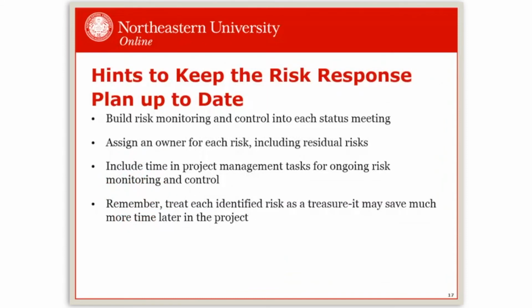Just some other things, keeping the risk response plan up to date. We've talked about the importance of adding it as a line item into each status meeting, delegating some ownership of that risk to a risk owner, and having some activity in your detailed plan that considers the effort and duration necessary for doing risk work.